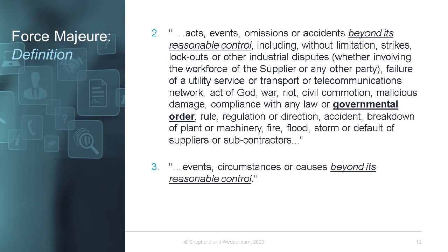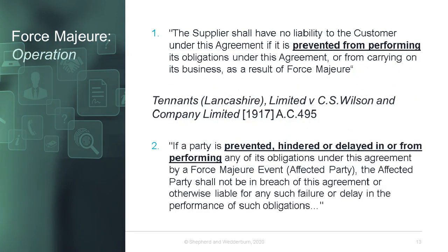It's important that there is at least some attempt at a definition or a test to be applied to determine force majeure. Previously, a clause which simply stated that usual force majeure clauses shall apply has been held by the courts to be void for uncertainty. And the second element to consider is how does the force majeure provision operate? Again, we have some examples on the slides.